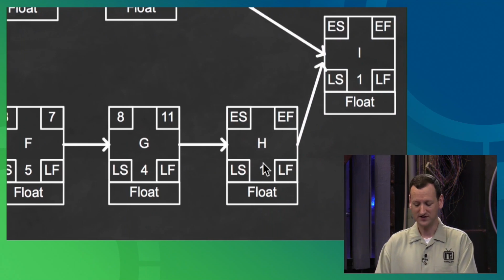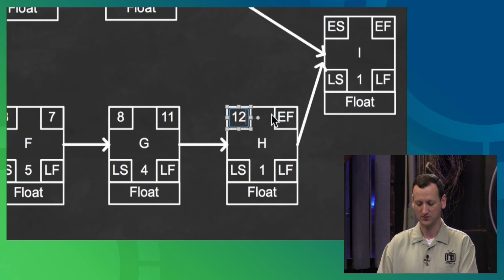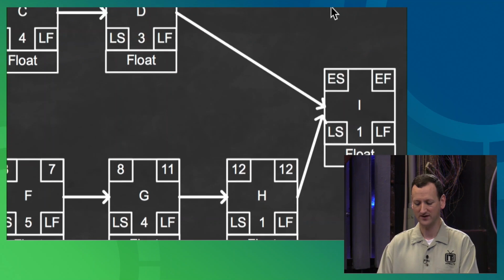All right, and then we move over here to this last one, task H, which only has a duration of 1. So it can start on the 12th, and its duration is 1, so I can just finish it on the 12th also. And then lastly, we get all the way down here to task I.